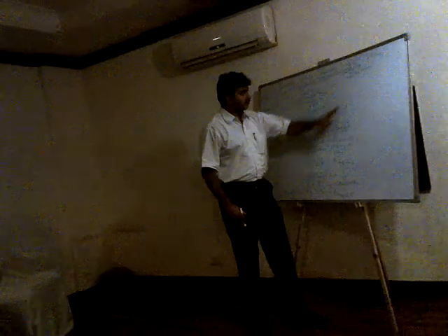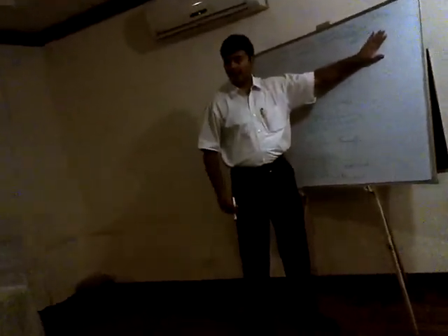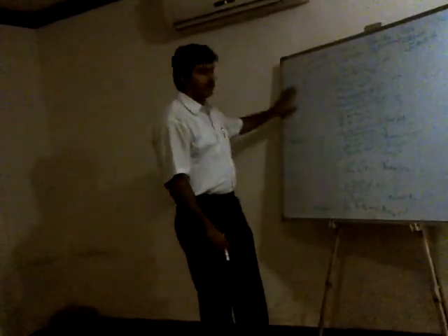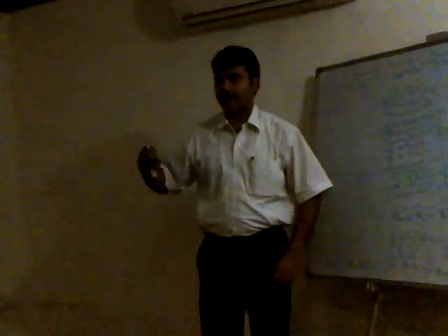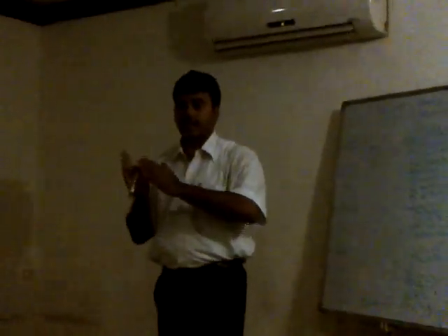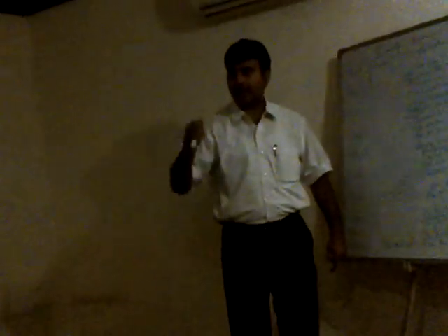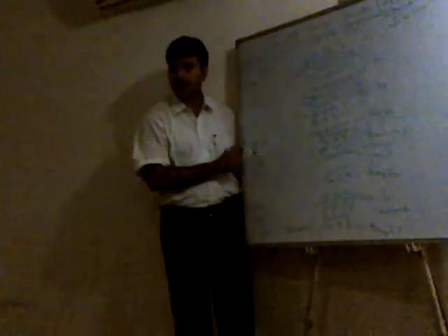Okay. Now, clear? For monitoring and controlling processes, we have seen the same thumb rule. You will be requiring your plan and your work performance data. Output will be the work performance information, and there will be the deviation. Whenever there is a deviation, there will be a change request, and whenever there is a change request, the project plan and project documents are going to be updated. The same thumb rule is going to be applied across all monitoring and controlling processes for scope, time, and cost.